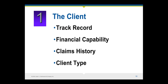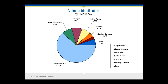But these claims are still difficult. The interior designer had to waive her $70,000 fee, and there was an additional $250,000 spent for legal and expenses. So you want to stay away from claims — they can be extremely expensive. This graph shows that 62% of claims made against design professionals have been made by the project owner, so picking the right client is essential.